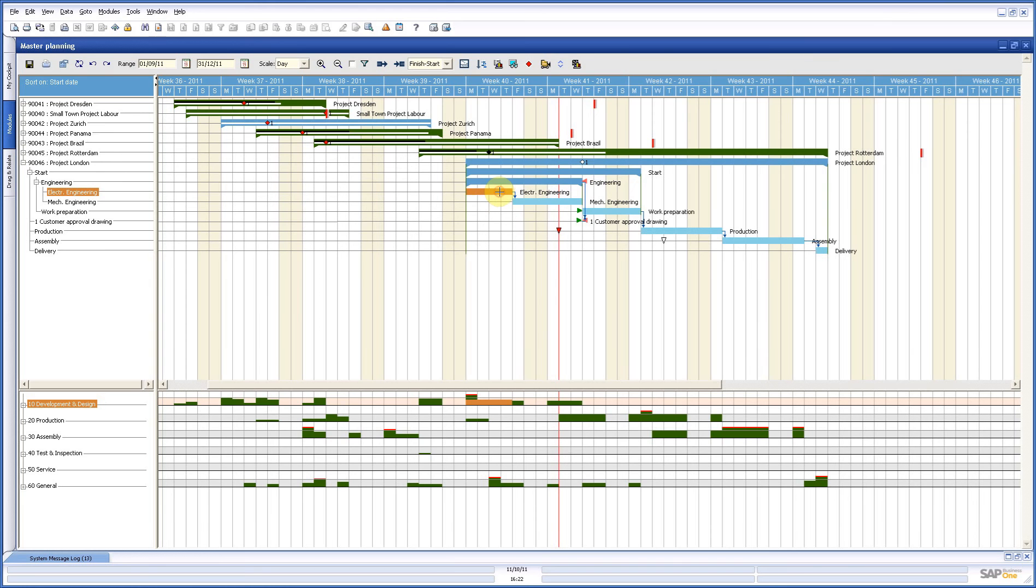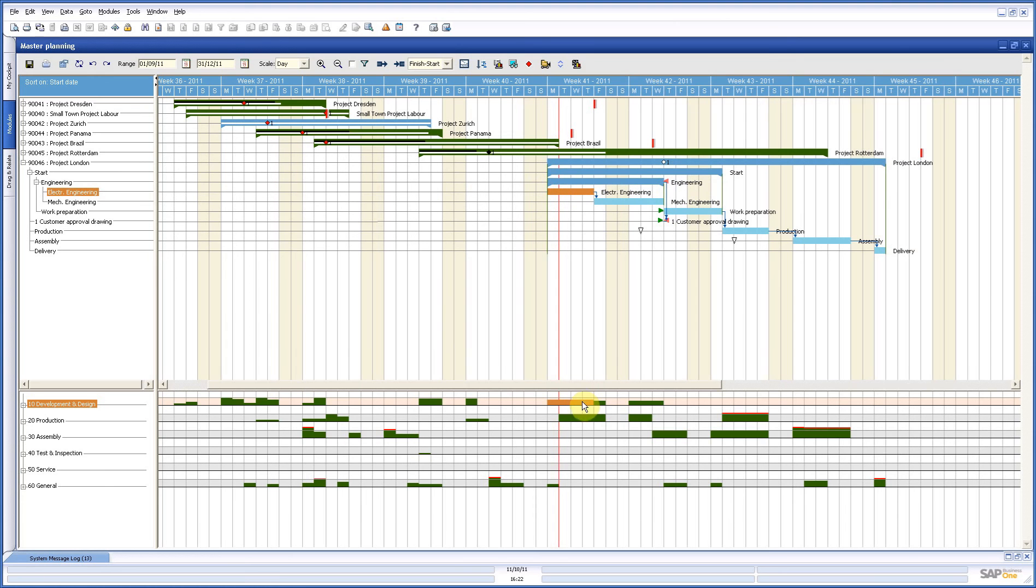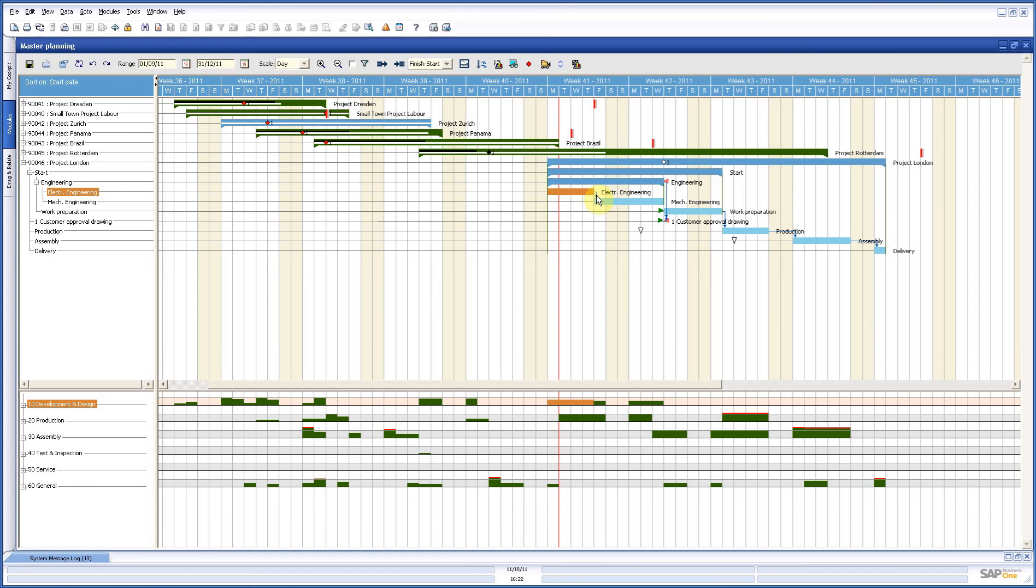If we move this to the right, you see also immediately that everything else goes to the right. That is because of those blue arrows there. Those are constraints and constraints make the planning dynamic.